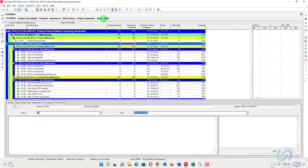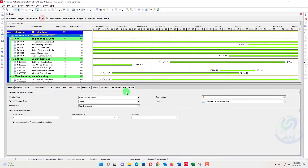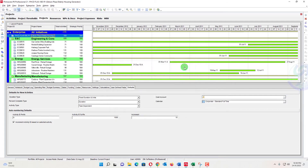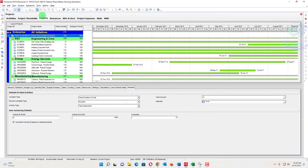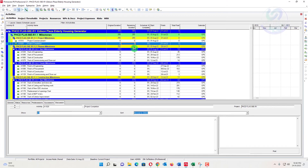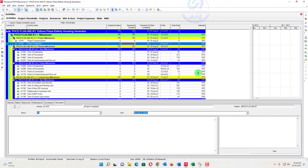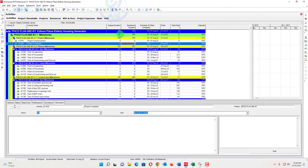There are already 261 days in the original duration and we need to show 365 days. The other activities also have durations that we don't need to change. Go to Projects, then Default. If the tab isn't shown, go to Customized Project and drag it to the available tabs, press OK. Then select the '7 into 10' calendar in the Default tab. When you assign '7 into 10' and go to activities, you will see 365 days at the top — no finish date changes, no calendar changes at the activity level.